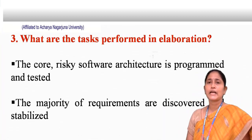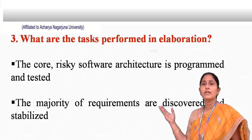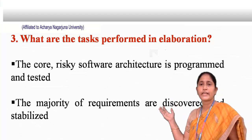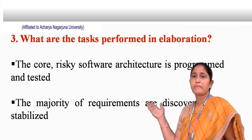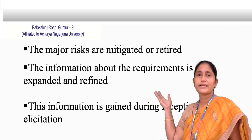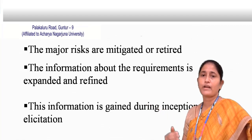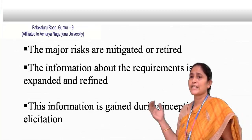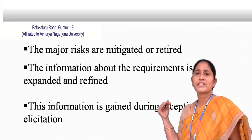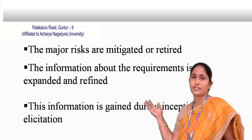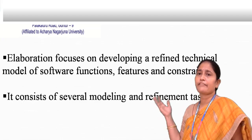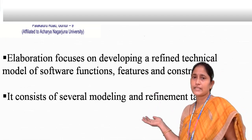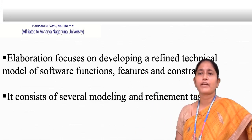The tasks performed in elaboration include: the core risky software architecture is programmed and tested; the majority of the requirements are stabilized, meaning made more stable; and the majority of risks are mitigated or retired, meaning we reduce the risks. The information about the requirements is expanded and refined — this information is gained during inception and elicitation. Elaboration focuses on developing a refined technical model of software functions, features, and constraints, and consists of several modeling and refinement tasks.